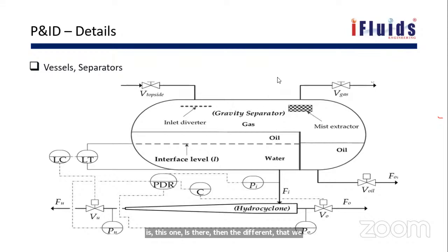And then similarly, a relief valve. Relief valve will be provided in the piping, and the relief valve will generally give the next rating only. So accordingly, we need to mention it. Wherever there is a spec change, we need to mention it. If we are not clear and are waiting for the vendor, we need to put a hold, so that the equipment will not go for procurement. They have to say it in the bill of material.